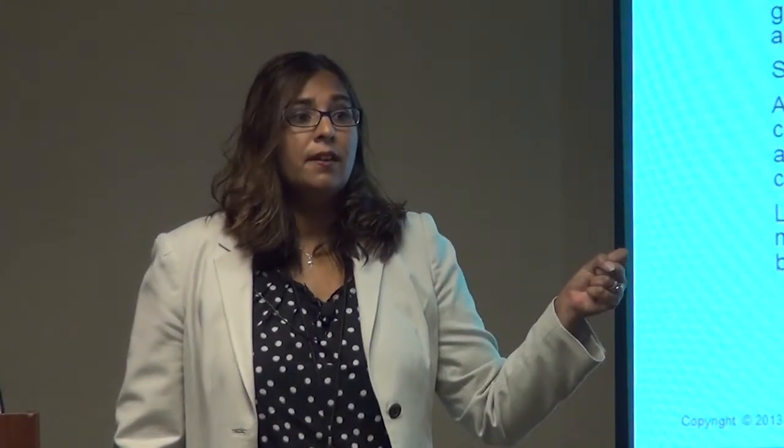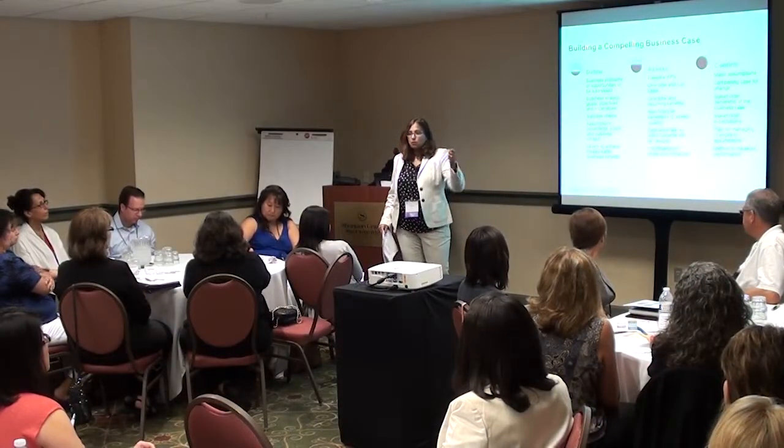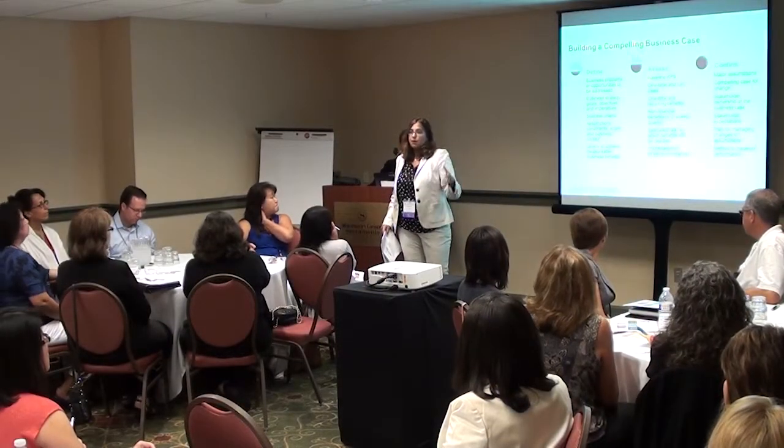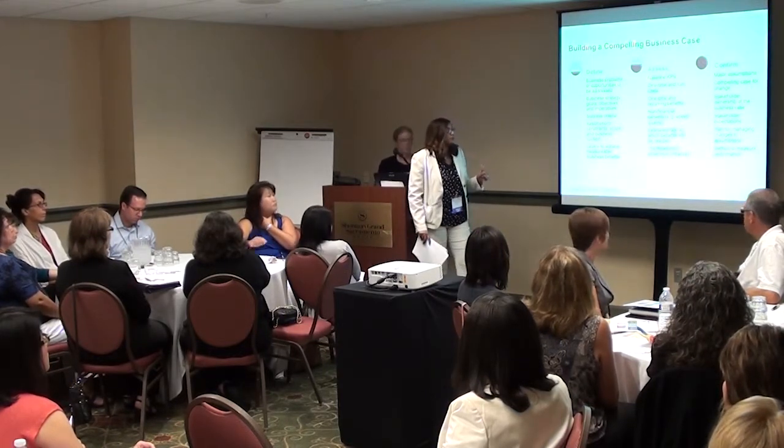And so you would put that in your business case along with a timing, and then when you build your work plans, your project plans, you actually put those in as milestones, and then you march toward those milestones and have a view of when that value is actually going to occur. And we'll talk more about that in benefits realization.